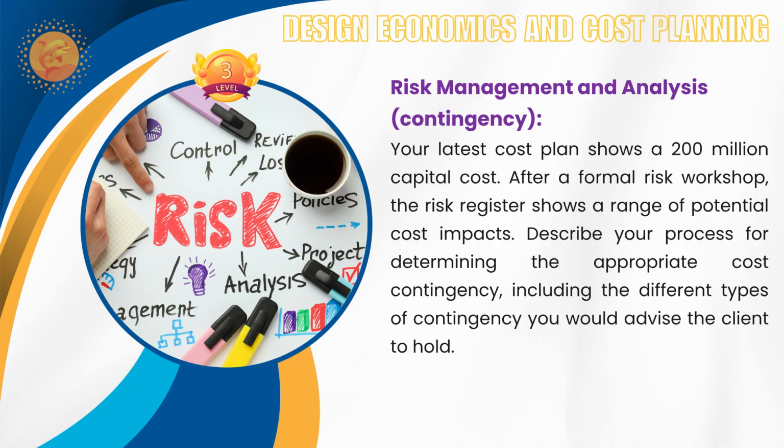200 million capital cost after a formal risk workshop. We will advise the client to hold... Because first of all, when we prepare some sort of risk analysis, we have to take the risk register. First of all, we have to take it from the benchmark of similar projects, what kind of risk we happen to have or common risk that do occur to the specific type of project, and define each risk and brainstorm and identify likelihood and impact matrix, probabilities, cost model, Monte Carlo analysis on the top 10 to 15 key risk.